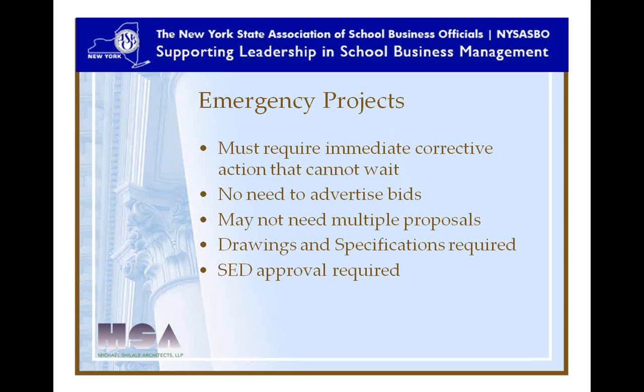There are some benefits to it: you don't have to advertise for bids, and you may not need to get multiple proposals. They still ask you to do drawings and specifications for their review. You will get an expedited review, which helps, and it's going to be managed just like any other SED project. We've had 2 emergency projects in the last 5 years or so. One was a roof that when we looked at it in the spring, we thought we could get another season out of it. It was too late to get the documentation up to SED, bid it out, and have the roofing work done over the summer, which we prefer to do.